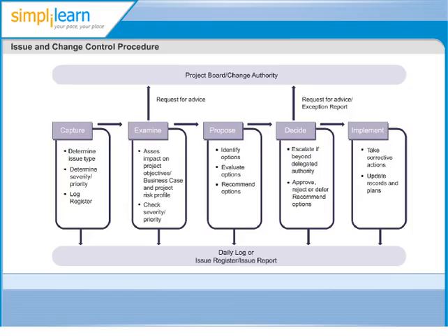severity before proposing resolutions. In the propose step, you need to consider alternative options for responding to it and propose a course of action to take. Consideration should be given to the effect each of the options will have on the project's time, cost, quality, scope, benefit, and risk performance targets.